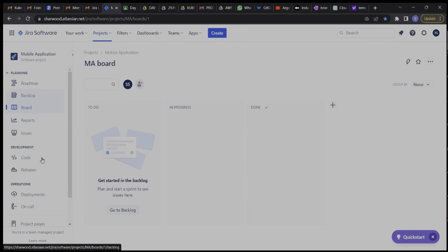Yes. Okay. Now this is our board. We have to do, in progress, we have done. So depending on the organization that you'll be working with and the processes that they undergo, the columns will be customized as per the processes that they have. So in the meantime, we'll add testing. We'll assume that we have to do, in progress, before it is done. We assume that it has to be tested, right?